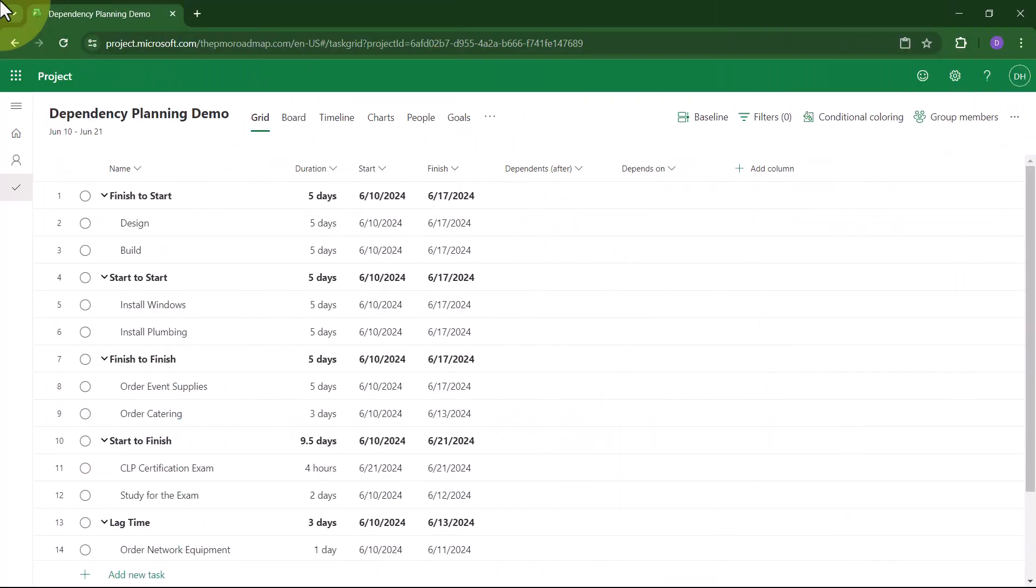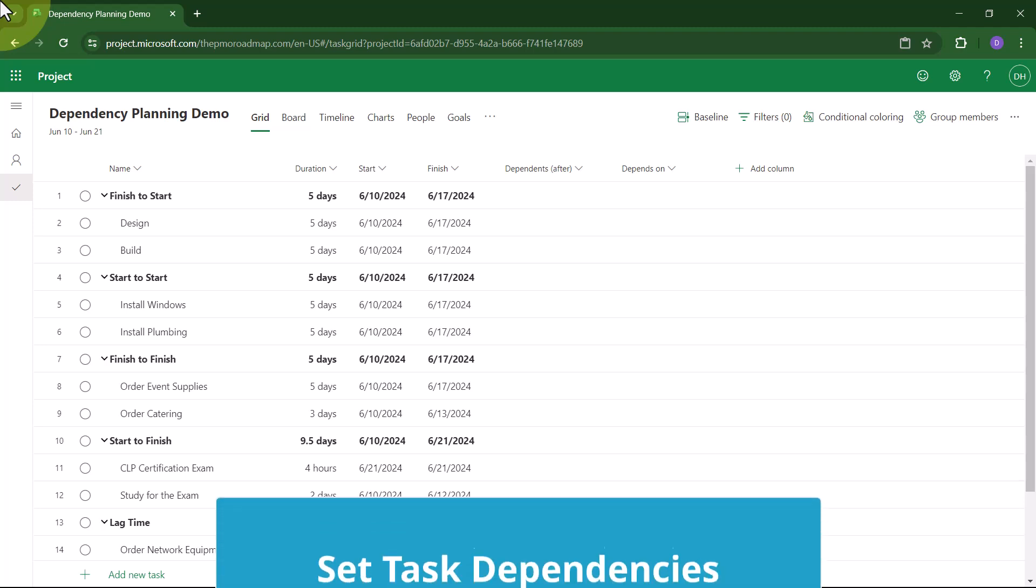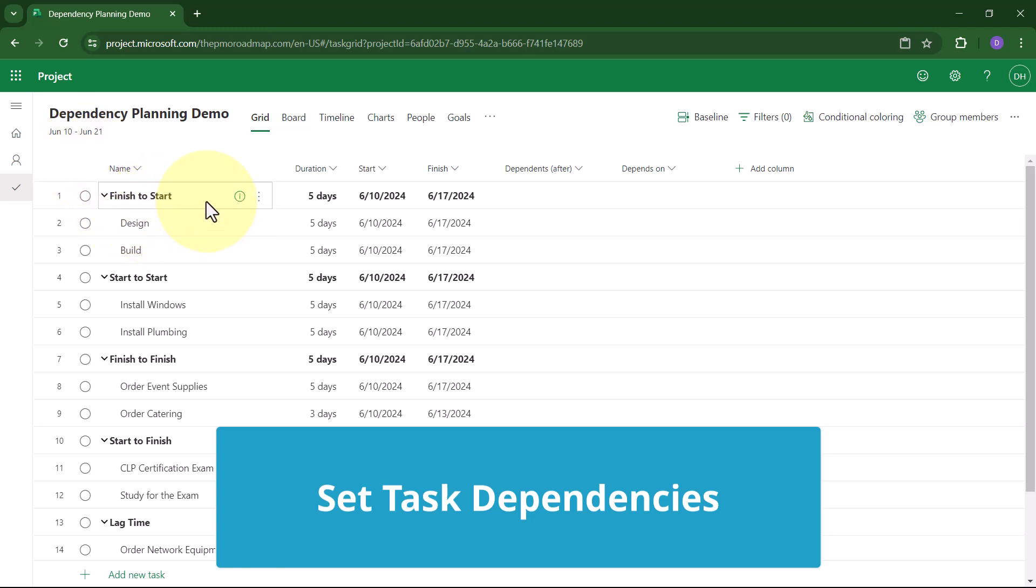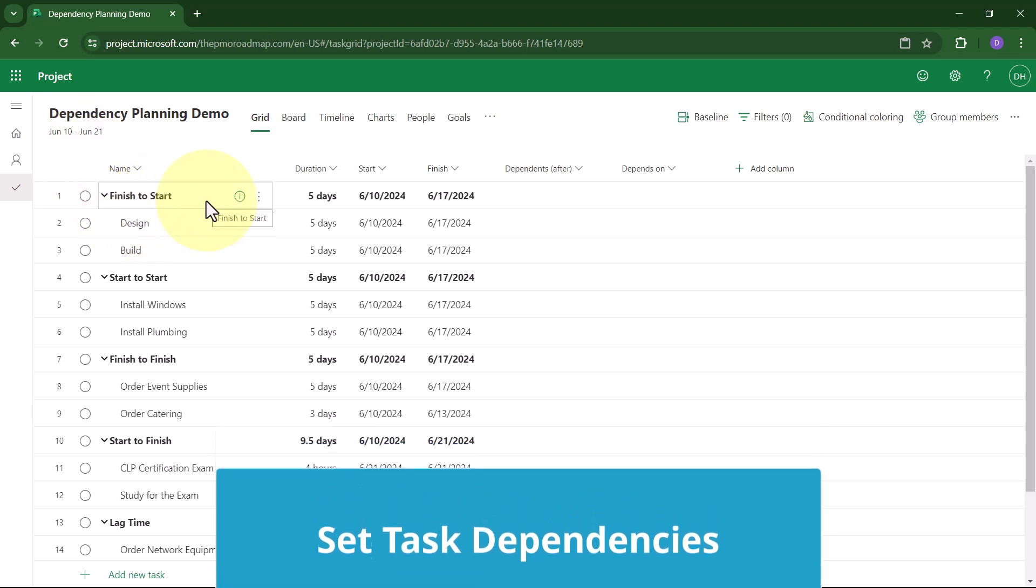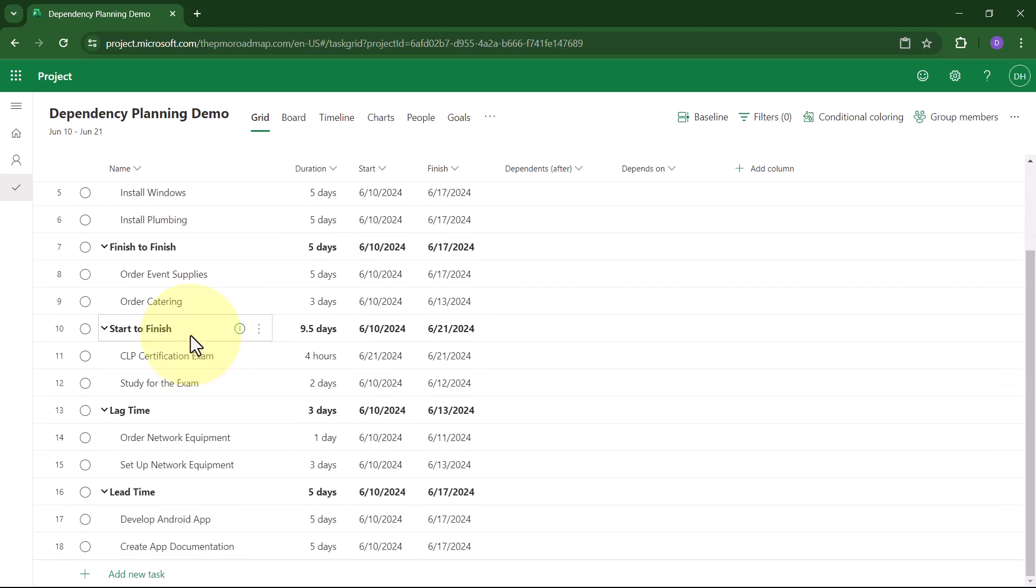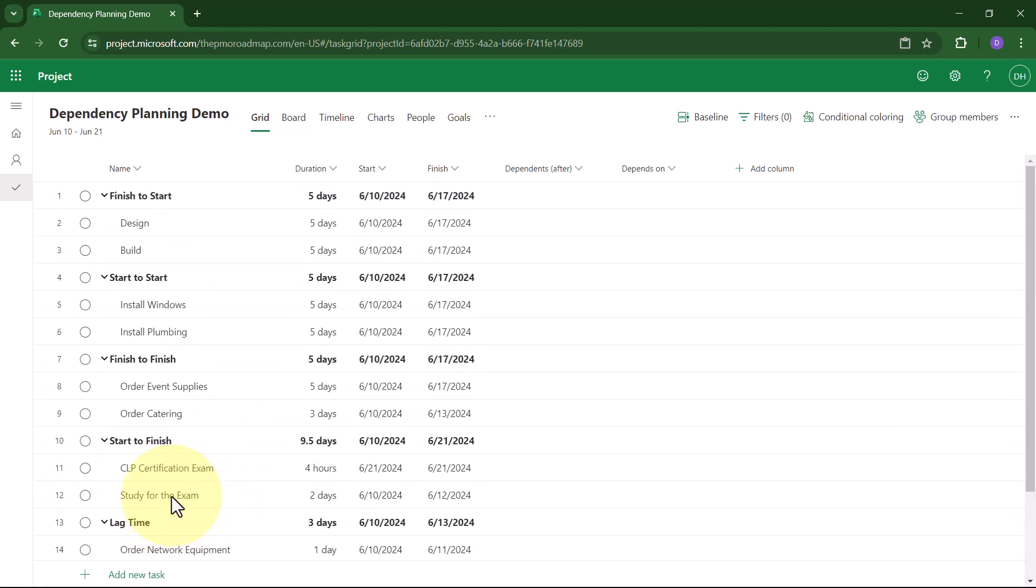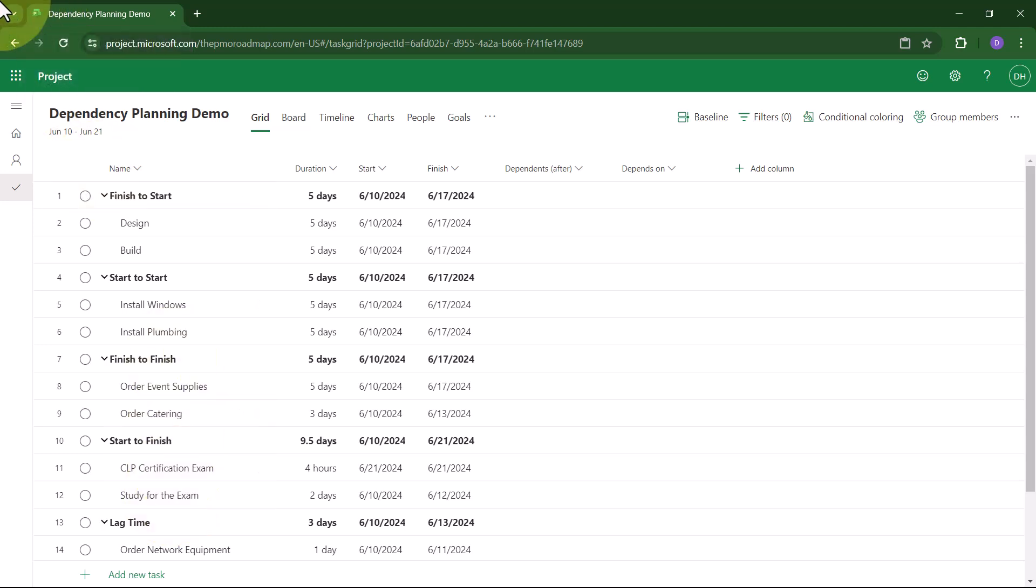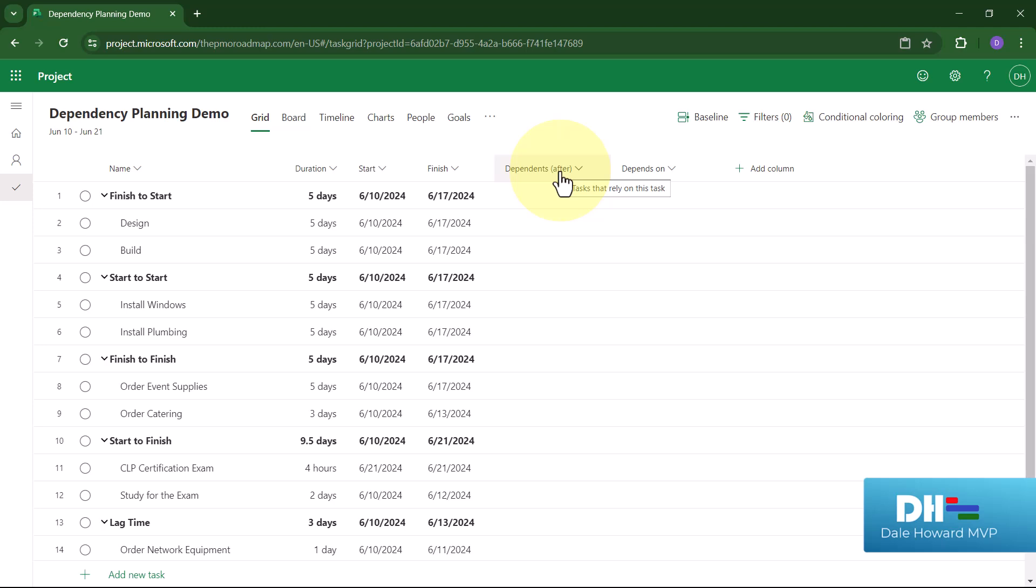In Project for the Web, Microsoft has recently added some new dependency types. In addition to the default finish-to-start dependency, we now have additional dependencies called start-to-start, finish-to-finish, start-to-finish, and we have the option to add lag time or lead time to any dependency type. Before you begin dependency planning, I do strongly recommend that you add two columns to your grid view: Dependents After and Depends On.